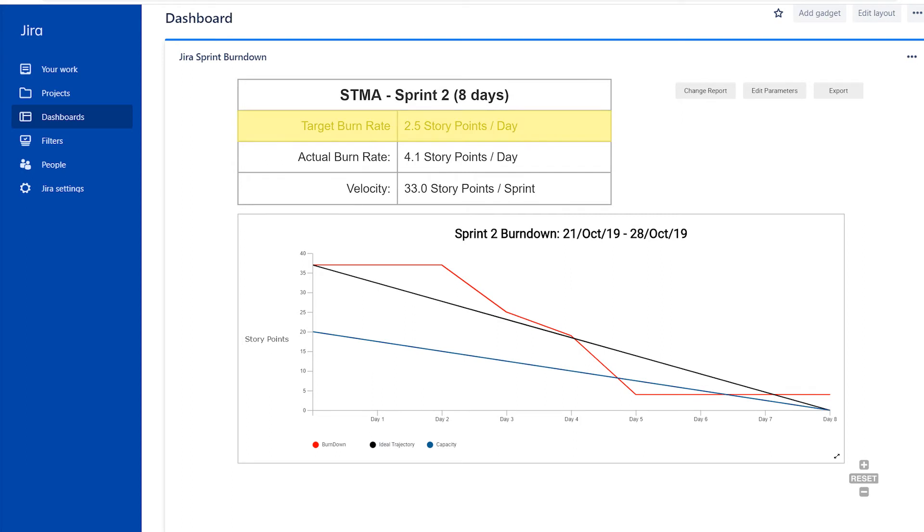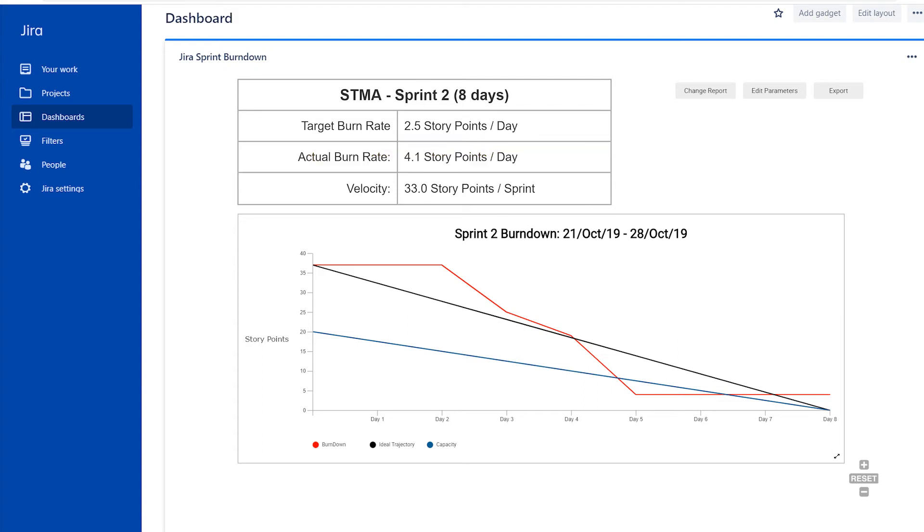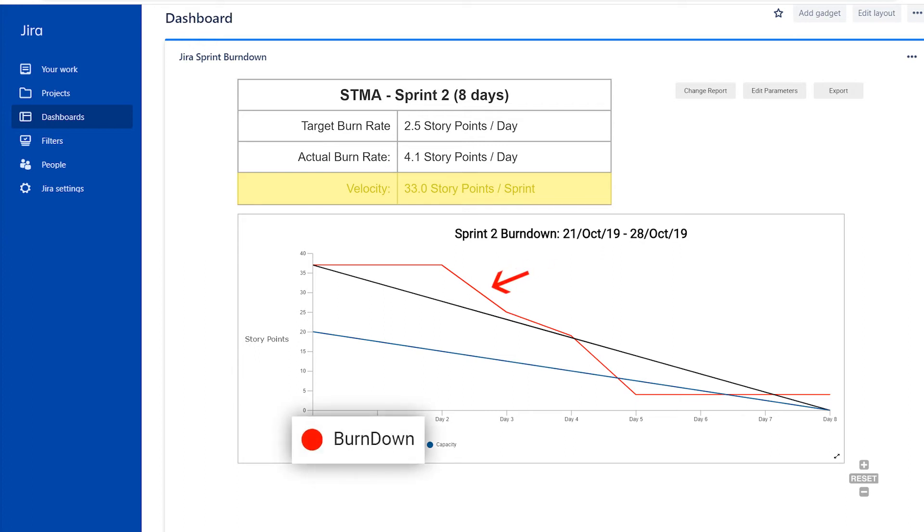The target burn rate is the amount of work that needs to be completed per day to complete all work by the end of the sprint. The actual burn rate represents the speed at which your team is actually getting through work. Your team's velocity is the actual burn rate. This will let you know how much work they'll finish during the sprint.